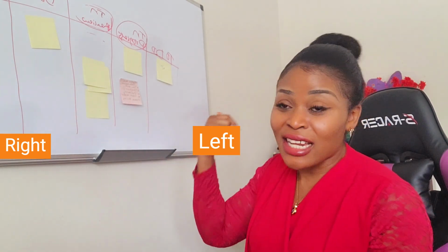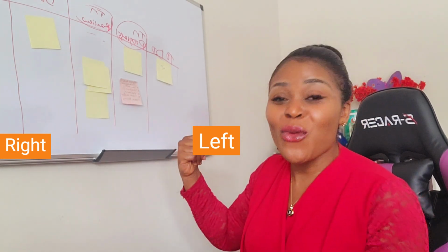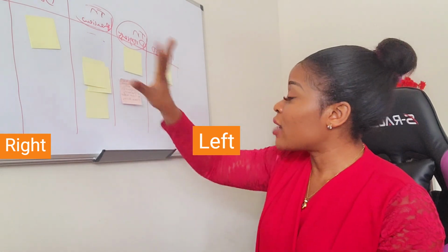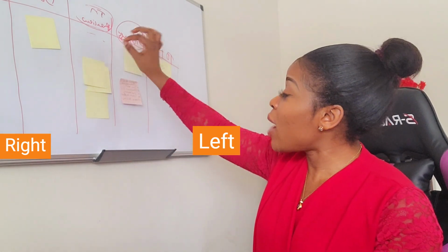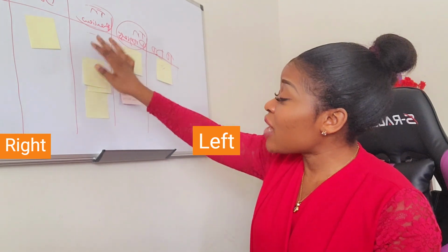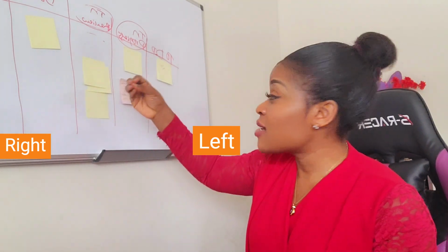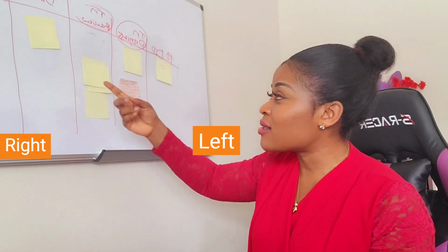I can show you that in another video, or join our mentoring program if you want to learn more on how to do that. Yeah, so I will color code it, and let's say if that item has been sitting there for more than 3 days, it turns gray. That already to me is a signal to talk about that.